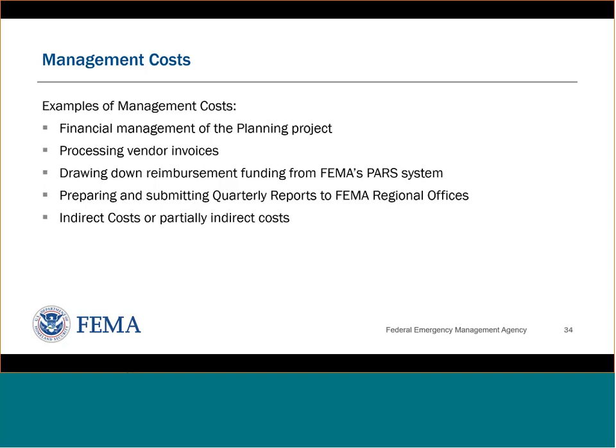Hey, Brenna, one thing I was just thinking about mentioning too is if you do the full 10% sub-application, what's that split between the federal and non-federal share? Yeah, thanks for asking that, Kayla. Management costs are paid at 100% federal share. So that is relatively new with BRIC. So that is covered by the federal share. So that would be 100% federally funded.